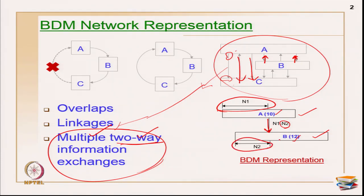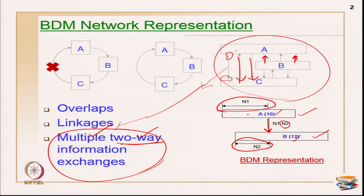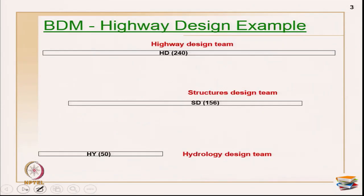N1 is primarily the time from the predecessor at which the information can be released, and N2 actually represents the time at which the information is received by the successor. That is how the information is represented as a linkage. So N1–N2 is a linkage and it shows: from the start of activity A, what is the time it takes to release linkage P1? And the same parameter P1 is required by B at the time called N2. That is how the BDM representation goes.